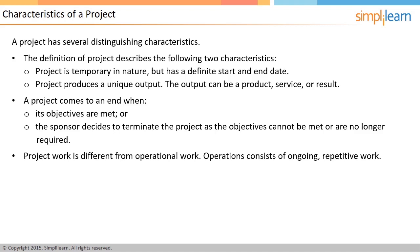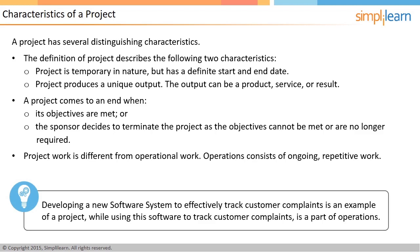It is important to differentiate project work from regular operational work. For example, your office receptionist does the same work every day of picking up incoming calls and directing them to the right person. This is an ongoing repetitive work and can be classified as an operation. Operations, unlike projects, are neither temporary nor unique. Creating a new software system to effectively track customer complaints can be an example of a project. When the software is successfully developed, the project objective is met, marking the end of the project. When you start using this software to track customer complaints, you are entering into the operations phase.